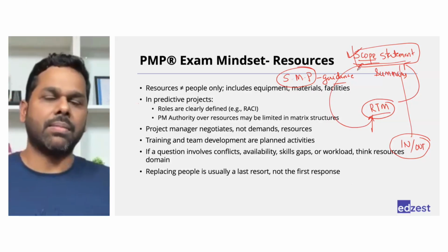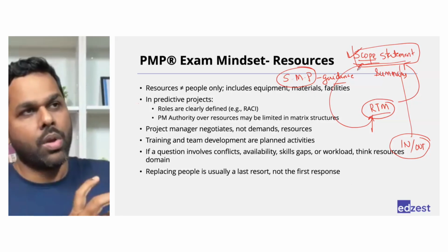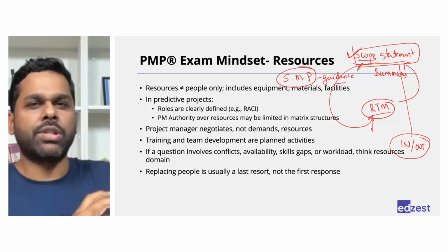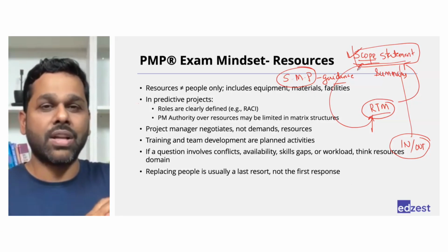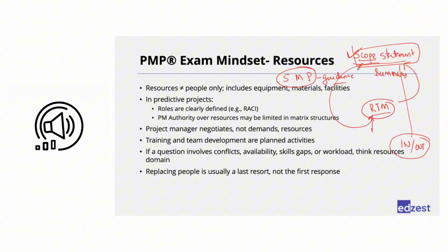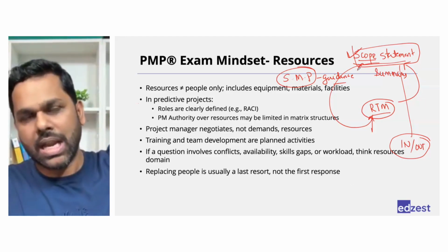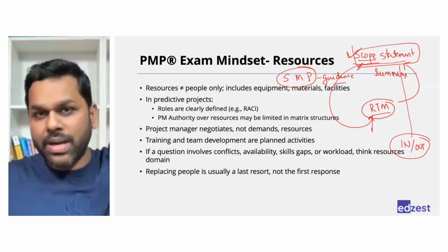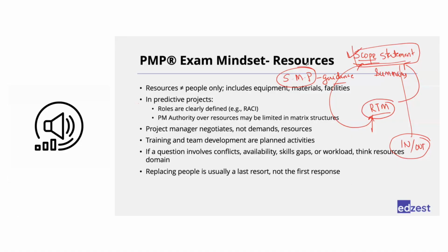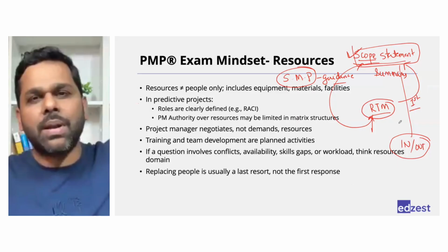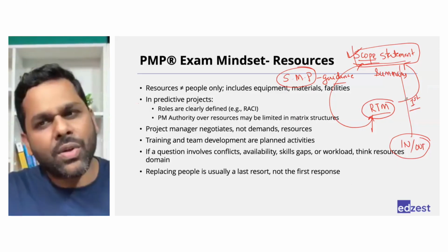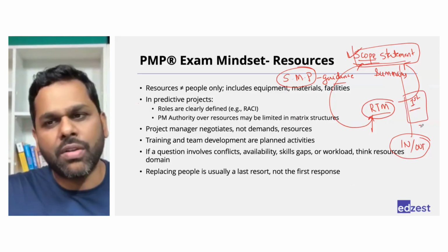Let's say, for example, that somebody said that you should be able to deliver the first floor using $500,000. So I understood that, okay, this is my requirement: I must deliver the first floor in $500,000. So now this first floor automatically becomes one deliverable for me. So I will say that, okay, first floor is a deliverable. Then I'll understand multiple other deliverables. Then I'll realize that the total deliverables are 5 floors.